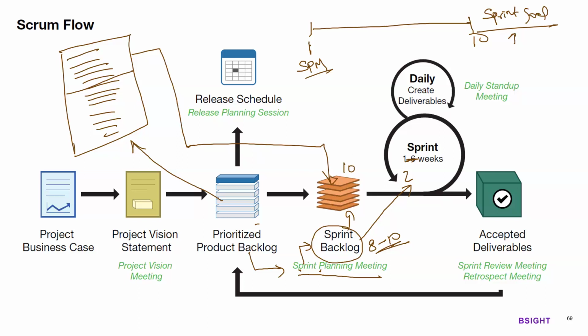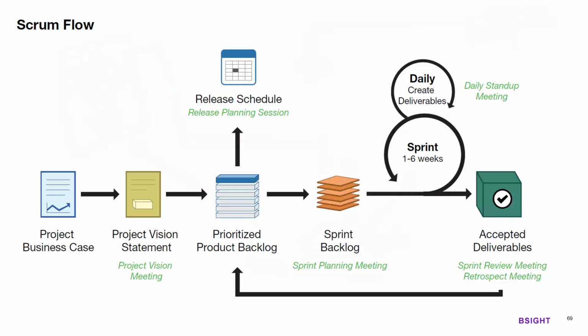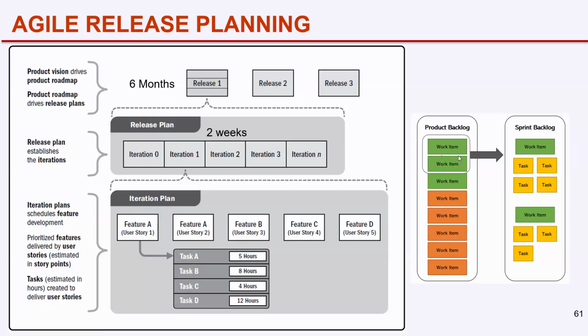So this is one of the concepts I skipped earlier. If you go back to the concept where we discussed choosing items from the product backlog and putting them in a sprint backlog: in the product backlog, you have only the features. In the sprint backlog, in addition to the features, you have a plan of what tasks you will do and in what order. In fact, this is what we call the iteration plan or sprint plan. That will also be in the sprint backlog.